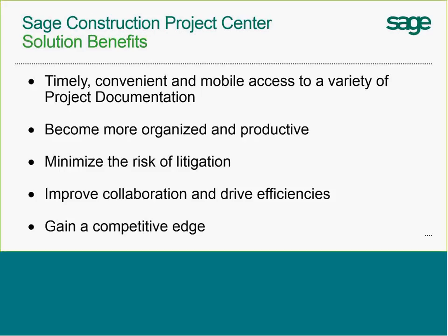If you're a custom home builder, you're putting out some brickwork out in front of the house, and during one of your RFIs, you have a question come up, you want to make sure the warranty is going to be 2 years, and the person agrees to it through the RFI process, but then later on they'll try to tell you it was only 1 year. We only do 1 year. We have all the tracking in our system to make sure you can pull out that story of what happened in case it ever comes to be.